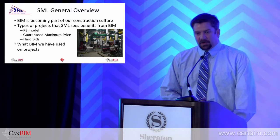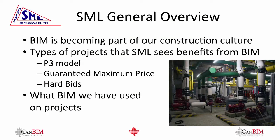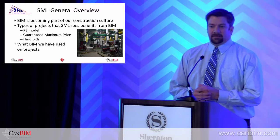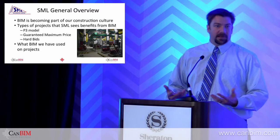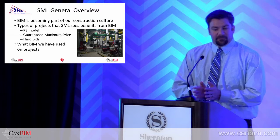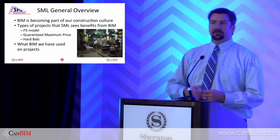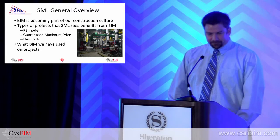The type of projects that we've seen it on, we've done a couple of P3 projects throughout Western Canada. We tried to incorporate BIM, but we found that the way we were constructing the project was a little bit design as you go, and we couldn't get the model up and running in time for us to actually use it to prefab or anything to benefit us. Same with guaranteed maximum price projects, that would work out very well if we were able to get it in advance enough that we would be awarded the project, with time to model it, using it mainly for our mechanical rooms and more congested areas.